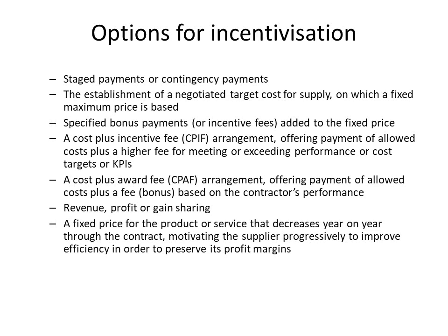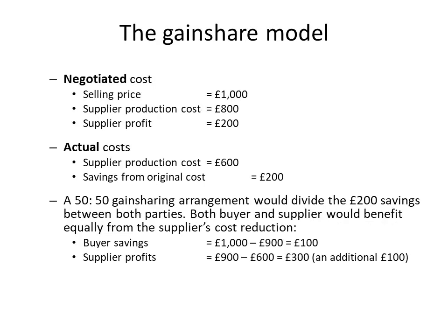How might we incentivise suppliers? Well, it isn't just about reducing costs. It can be stage payments on completion of activities, bonuses for improved performance, quicker delivery, and various cost plus award fee, cost plus incentive fee options.